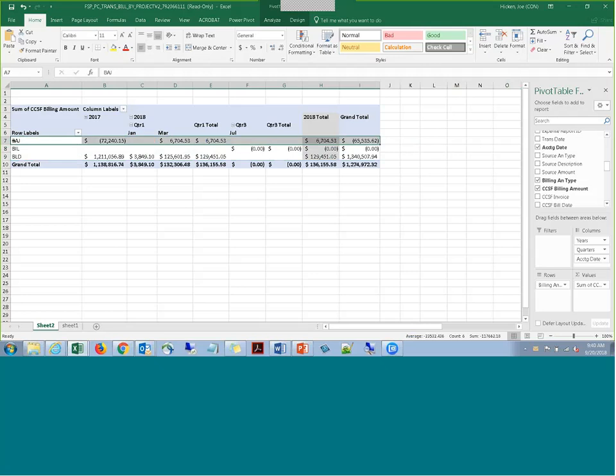The other analysis types that you'll see are DEF, which is deferred. The user's deferred a line or lines on their project. OLT, which is over the limit. WTO, which is write off.